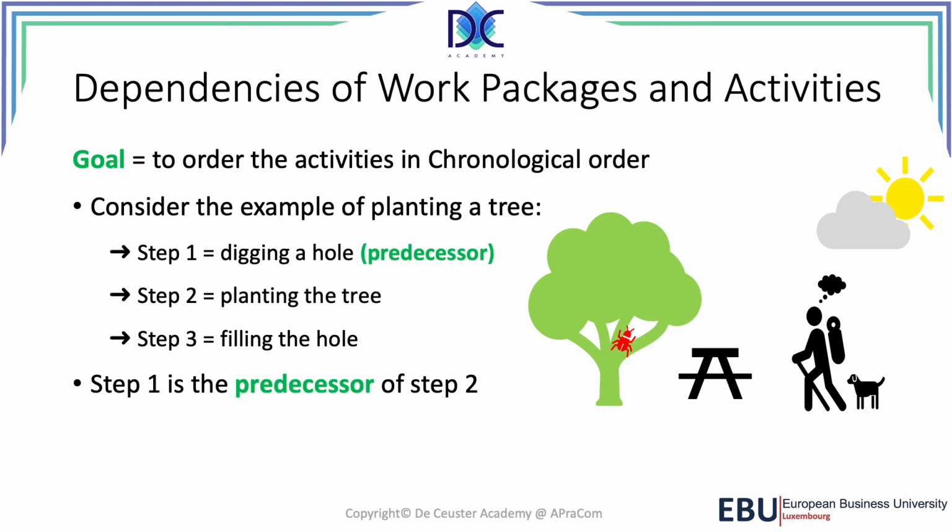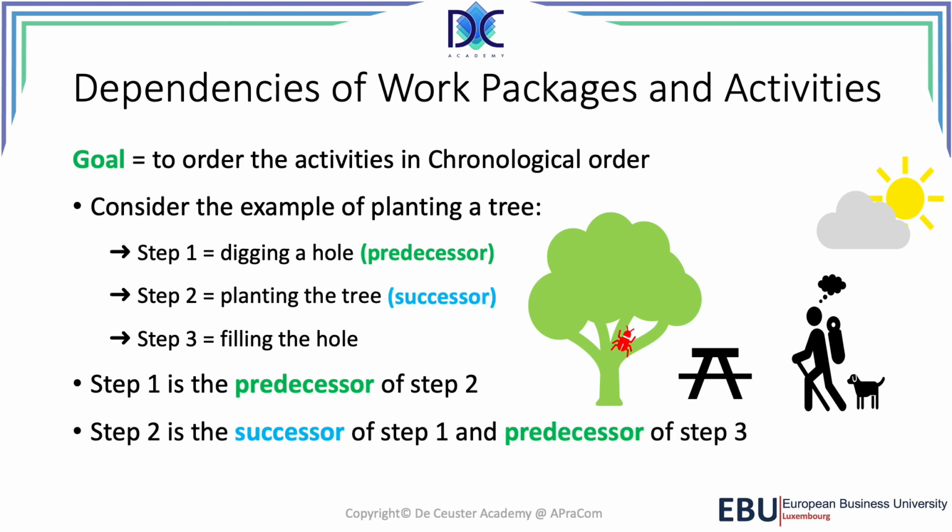Now, we call step 1 the predecessor of step 2. So basically, this means that we have to do step 1 before doing step 2. And we can only start with step 2 once step 1 has been completed. Step 2 is the successor of step 1, but it's also the predecessor of step 3. And basically, step 3 can only be done when step 2 has been finished.